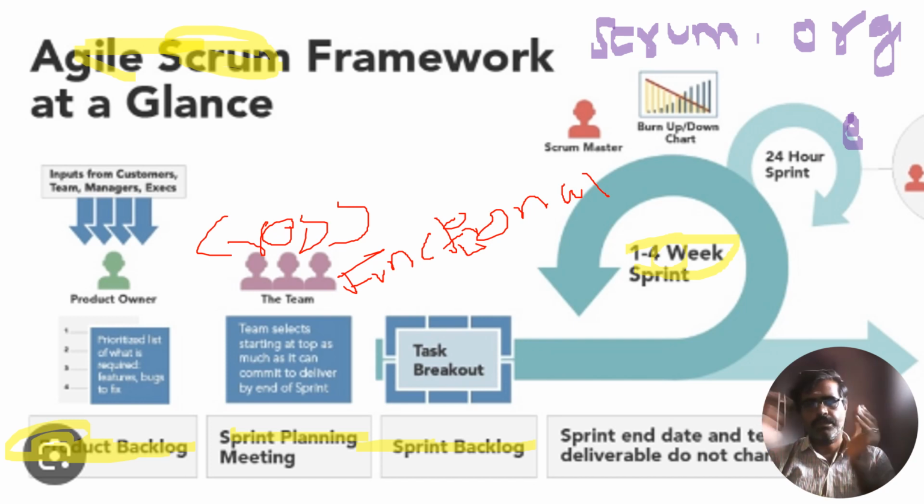So work is broken down into releases, which are further broken down into iterations. A strategy meeting should happen at least once in 12 months, and the duration is generally 4 to 16 hours, and all the stakeholders are invited to this meeting. So these are important things.